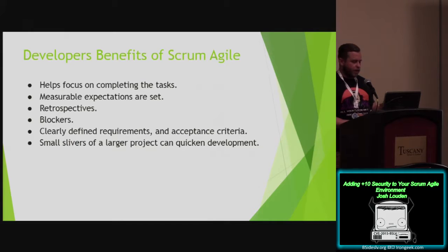Short daily updates are given in small meetings by individuals about their specific tasks, just to recap either the previous day or what they intend to work on during the day, and discuss any blockers or issues they might have or foresee to complete a specific task. There's measurable expectations of what they can accomplish on a specific task for a defined length of time. So when a task is accepted, it already has an estimation of how long you need to complete that task.